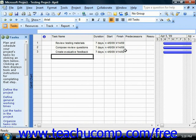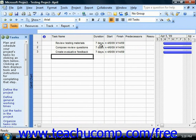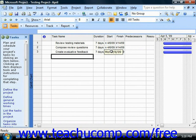Each task that you create within your project file must have a duration. This duration can be measured in any unit of time from minutes to months, but most often is measured in terms of hours, days, or weeks. When entering your tasks into the task list, you can enter the duration into the Duration column of the Table View within the Gantt Chart View.